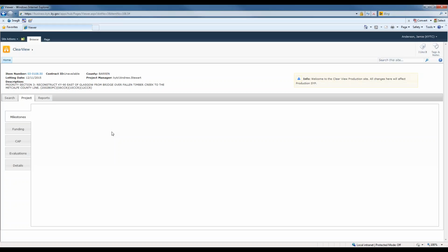So as actions occur, you can go into the milestone and enter any date or information for any of those values that are under the milestone. Just remember, for the reporting, it's going to pull the latest value entered on the report.